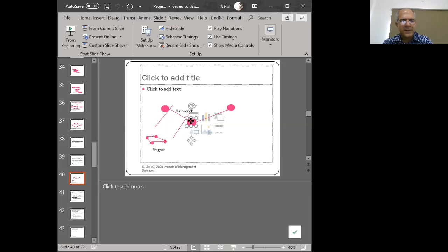We've got an activity, and then that finishes another activity, and then that finishes another activity, and we can press on some magical minus button and hide all the minor activities that happen between these two. So we can simplify our diagrams and look at it at a higher level of abstraction. Then we can open up our diagrams and look at it at a lower level of abstraction, right? So if our diagram is hiding information, this arrowhead here is then a hammock activity because it's hiding a lot of info. And if we could expand that, we'll find that there's another minor network diagram hidden in here.